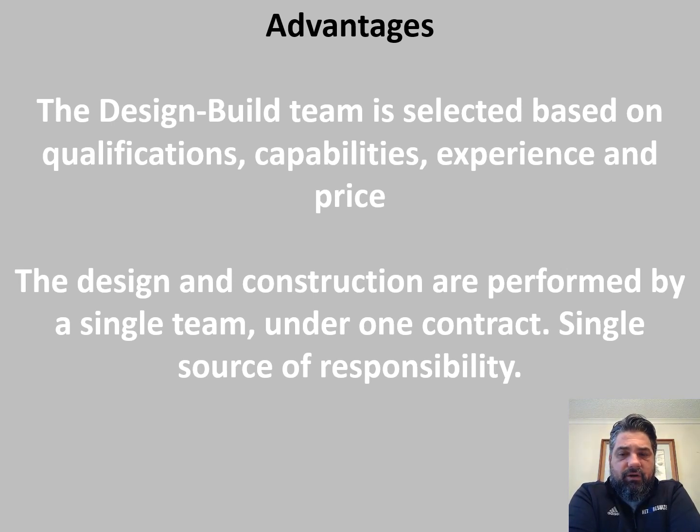The design and construction are performed by a single team under one contract. So there is a single source of responsibility. That's kind of nice for an owner. I mean, they have one contract that they have to worry about for the whole project. And if there's a problem, there's only one call they have to make, and that's to the design build contractor.